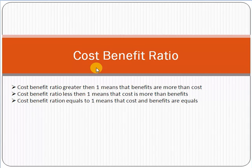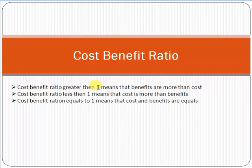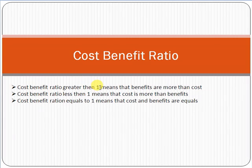Now for the mathematical calculation: the cost-benefit ratio. If your cost-benefit ratio is greater than one, that means the benefits are more than the cost. If the ratio is less than one, the cost is more than the benefits. If the ratio equals one, the cost and benefits from the project are equal.